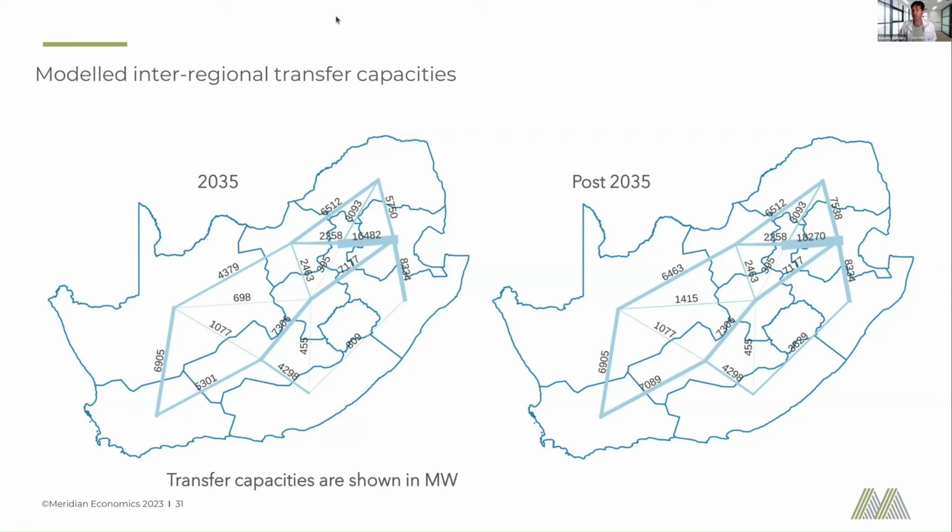While with a battery, you can import it from South Korea, and you have a total project timeline of 18 months. And you don't have much risk, in that the batteries are made in a warehouse, so you can actually get a fixed delivery time.